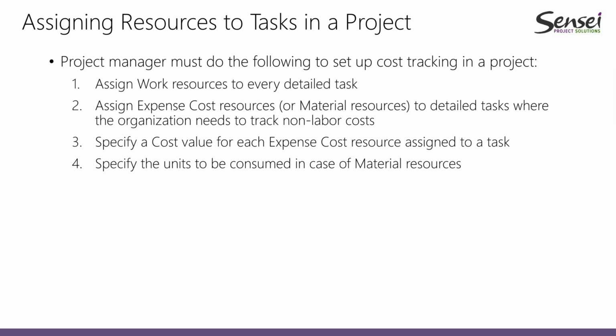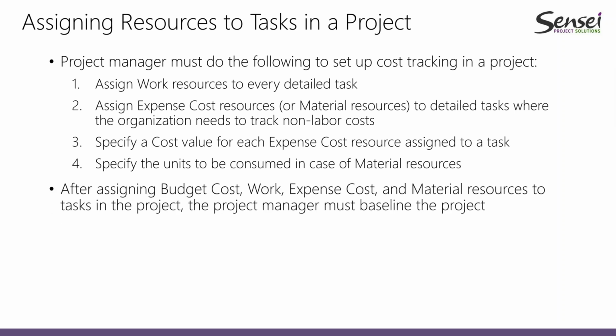After that, if we are using material resources, we can also assign material resources and determine the number of units that we will be using for each material resource that we might have in our schedule. So after we do all of this, we have our budgeting in place, and we have assigned people to the tasks in our schedule.